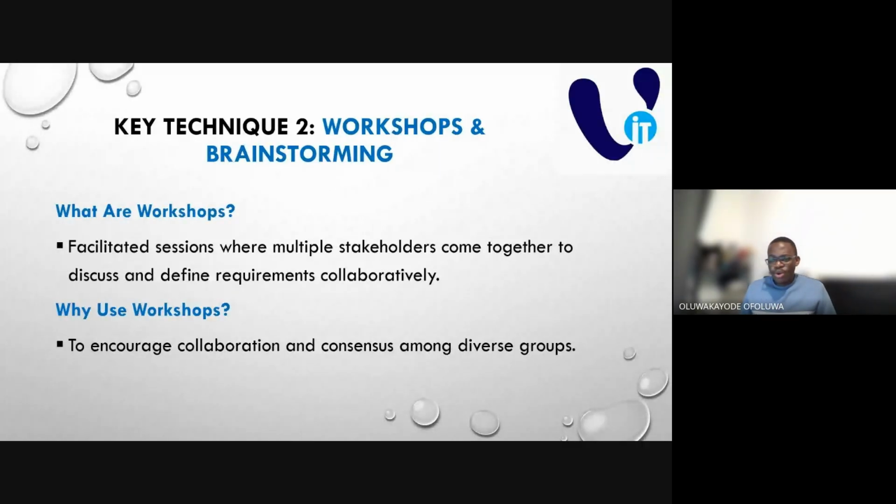You use the workshop. You don't use interviews for consensus. You use interviews to build rapport, to have this one-to-one conversation. You use workshops for consensus. Because if you're using an interview, one person may be saying something else when you're having a one-to-one with them, and another person may be saying another thing. So we use workshops for collaboration and also to get consensus.